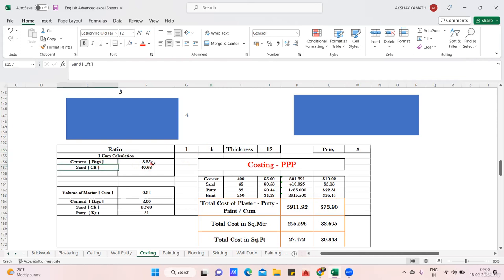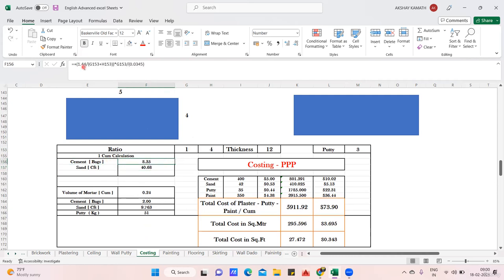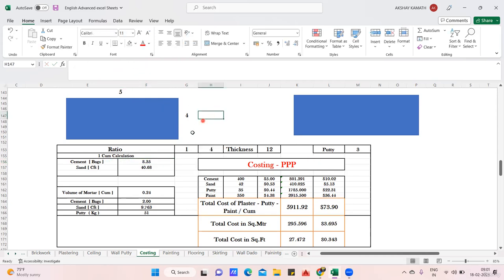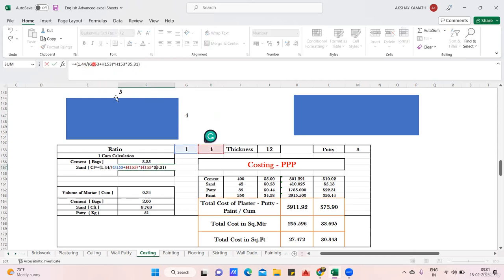For a ratio of 1:4 and thickness of 12mm, you need to know cement bags and sand required. This is from my plastering quantity: for one cubic meter it is 8.35 cement bags and 40.68 cft of sand, which I calculated in a previous lecture. For cement: 1.44 divided by (1+4), multiplied by the volume reference, then divided by 0.0345 gives the cement quantity. For sand: 1.44 divided by (1+4), multiplied by the sand ratio, then multiplied by 35.31 gives sand in cft.